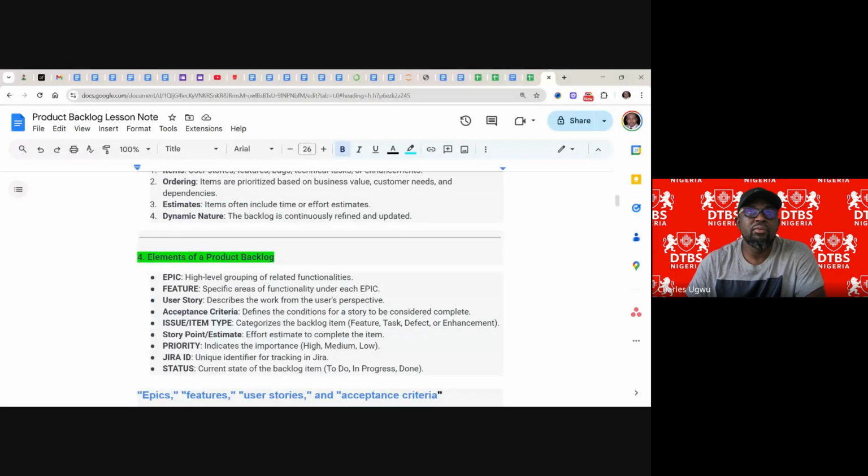Anytime we add up to 80 story points, the Scrum Master should be able to query the team, asking why they are adding that. Are they sure they can finish these story points? It's better to select the amount of work you can finish than taking some work back after you have selected them. It doesn't look so professional. It means you do not really understand your capacity.